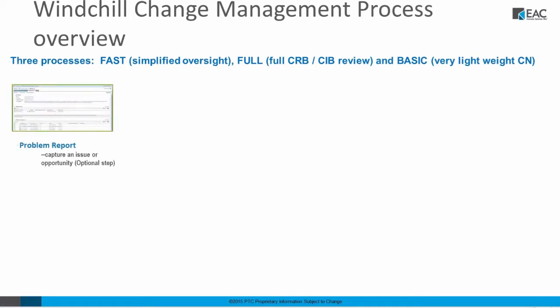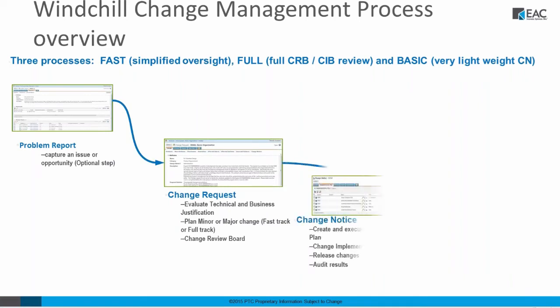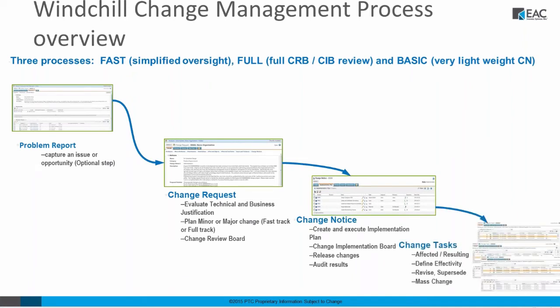So let's kind of take a look at an out-of-the-box change management process that we get in PDM Link. The first one is we would start out with a problem report, then that would be reviewed to make sure that it's valid. That would go then to a change request. Again, at the end of the change request, that would be reviewed. Finally, that goes to a change notice, and from the change notice after being reviewed, the tasks would be delivered and the changes would be enacted.